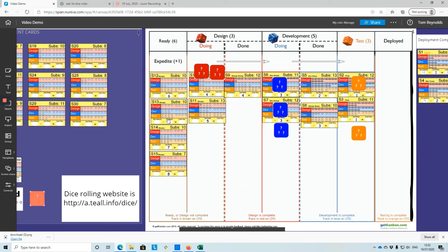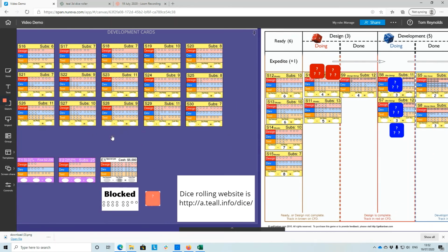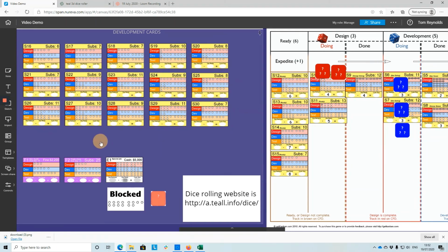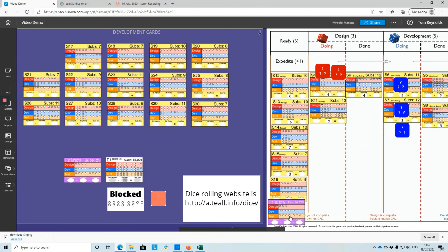So at the end of day 9, I can replenish. I have a WIP of 6. We only have 4 tickets in our queue, so we can take tickets in any order we want from our backlog of options. So perhaps I will just take ticket F16, and that's what we're going to bring in, and we're going to bring in maybe F1, for example.